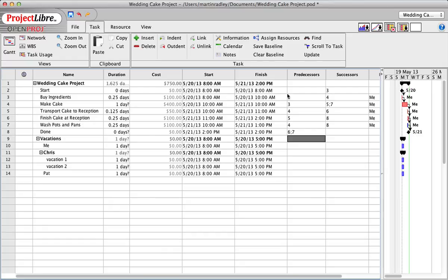All right, so the 5th check that you should do is that there are no dangling tasks. Again, what you want to avoid is tasks that are assigned work and you think they need to get done, and yet they don't seem to support any other work in your project schedule. This is a technique to make sure that all work is leading to done, right? So no dangling tasks.